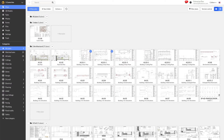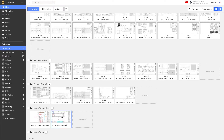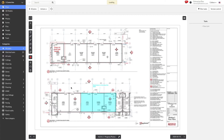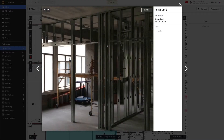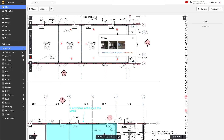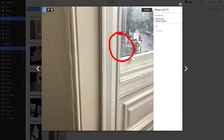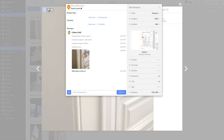Now, for those of you who are working from home or a remote office, here are some ways you can stay on top of what's happening out in the field. The first thing you'll want to do is sort through the progress photos taken the day before. You can do that in two different ways. Option 1: you can view progress photos plan by plan or floor by floor by going to the progress photos folder created by your team. Click on each hyperlink to view the progress in that specific area. Option 2: sort through photos from the Photos tab and see all of the photos taken within the last day. If there's something that stands out and seems particularly interesting or problematic, click the arrow to see the plan or task that the photo was taken from.